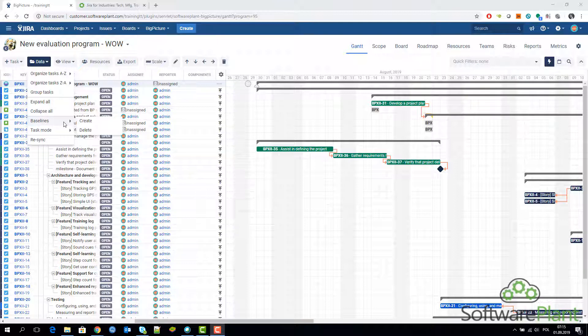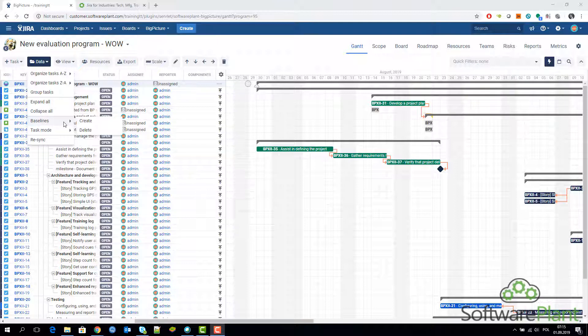There are good things about baselines and bad things about baselines in Big Picture. There is nothing wrong with the functionality, it works perfectly. What Big Picture actually does is that it creates a copy of start date and end date when you make a baseline.